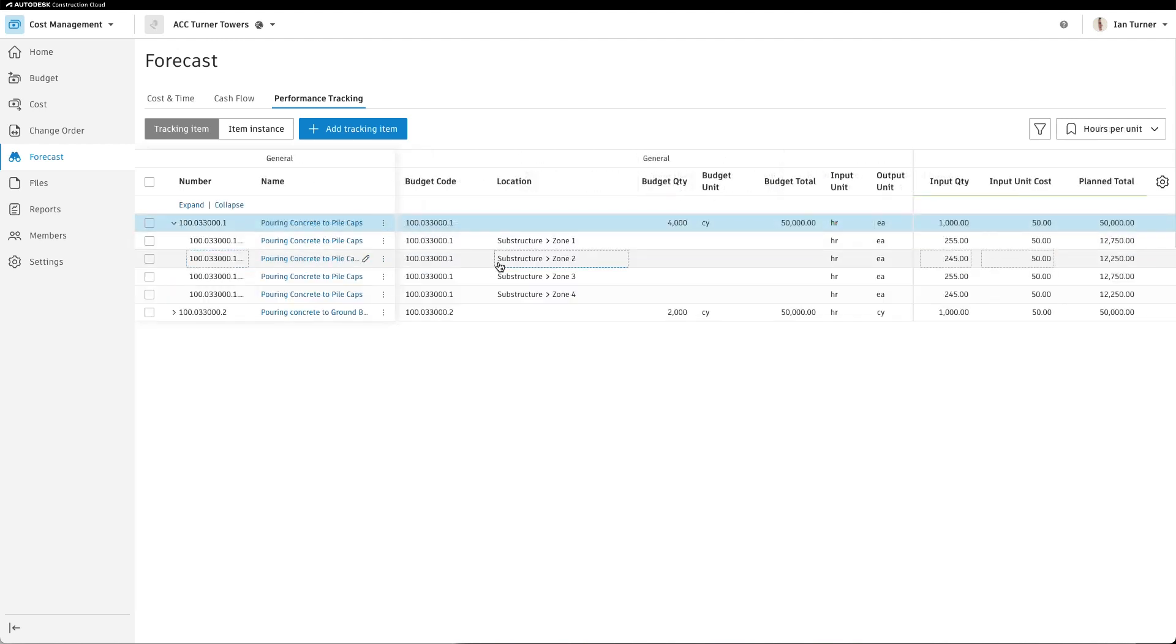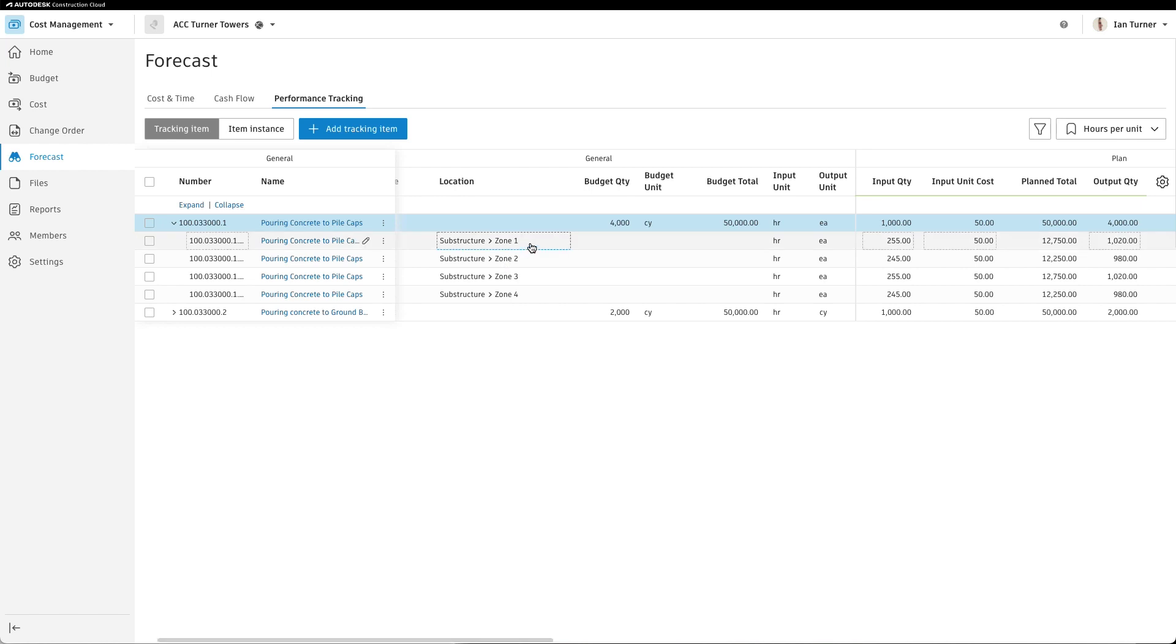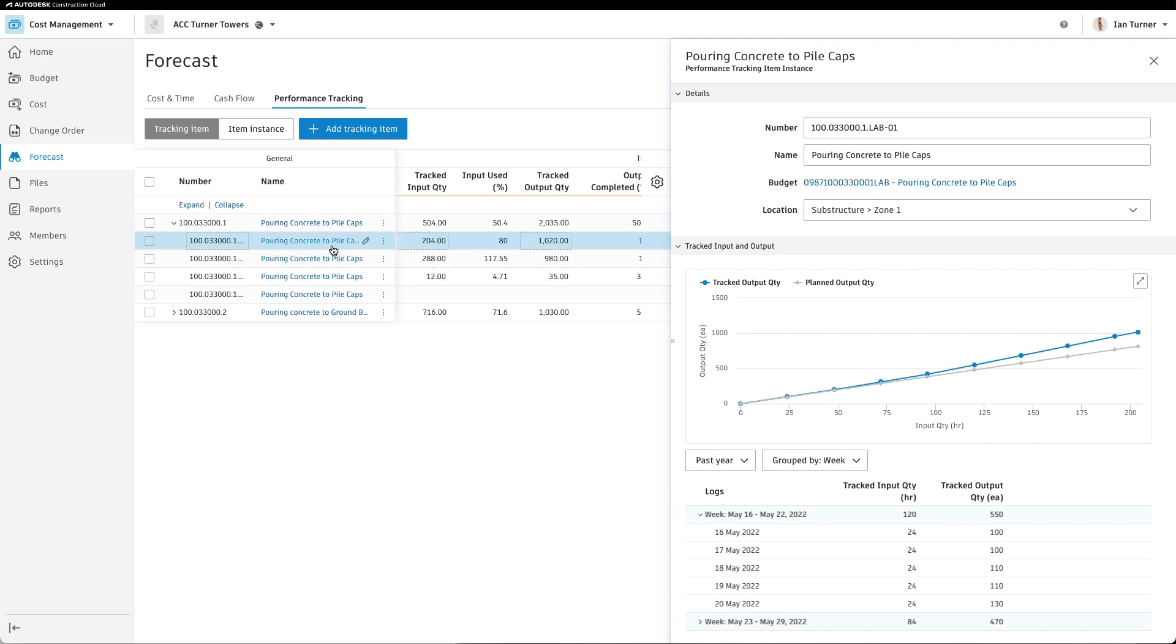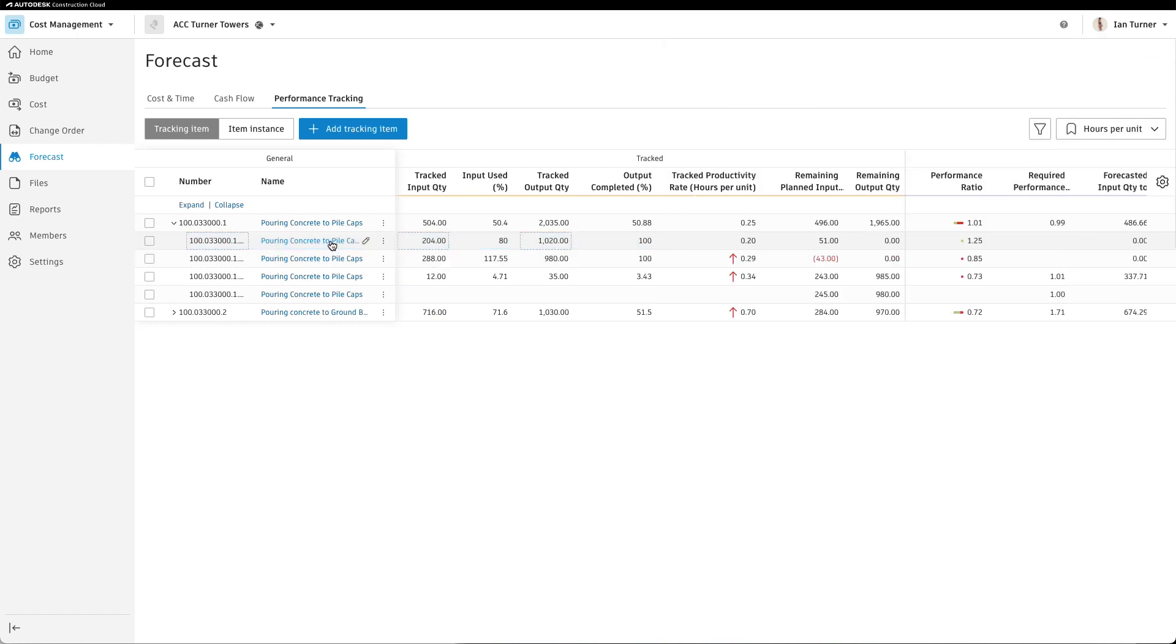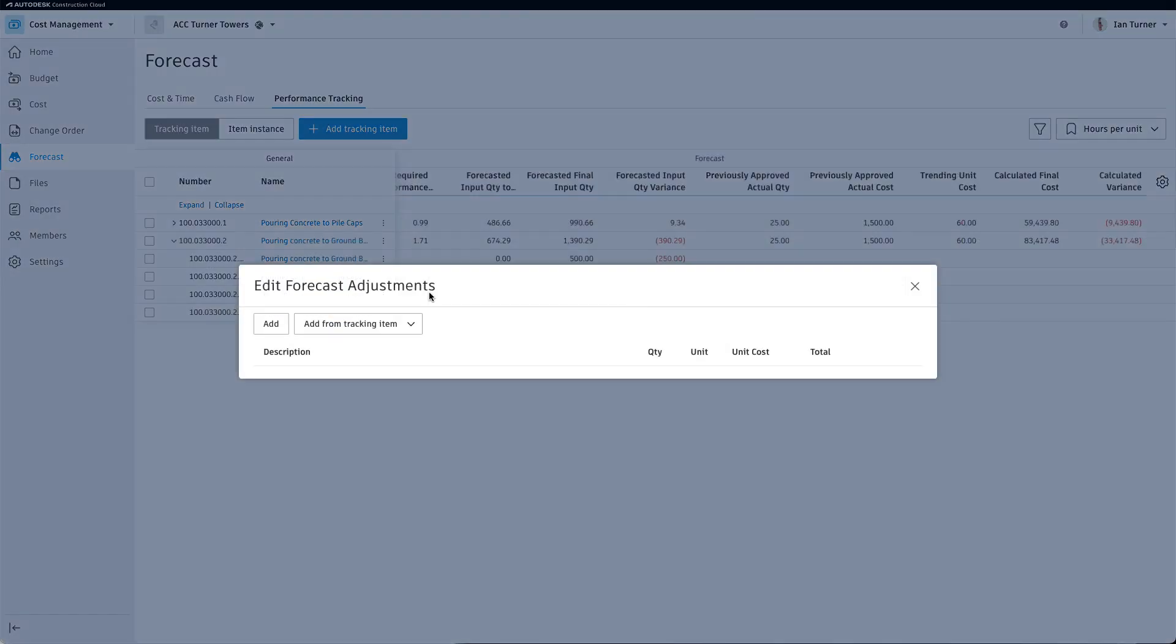self-performed contractors can connect manpower data to budget items and track them on a granular level. The system automatically compares actual data to the plan and provides you with visual indicators to easily assess risk. With this workflow,